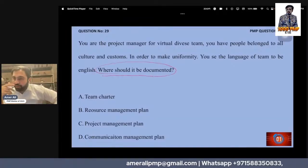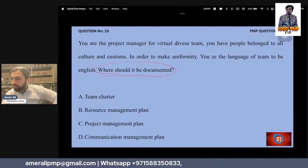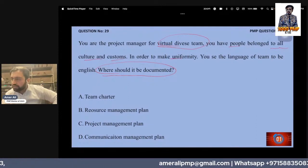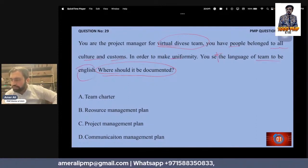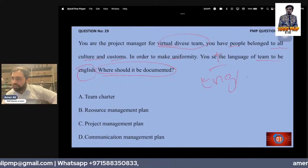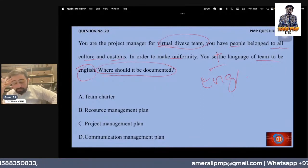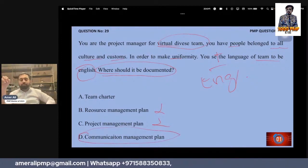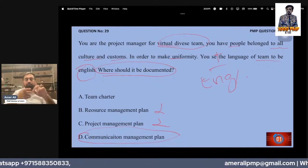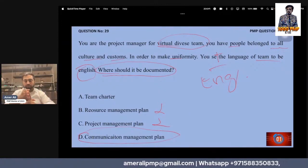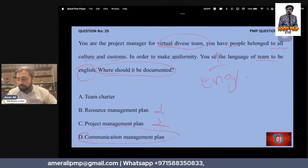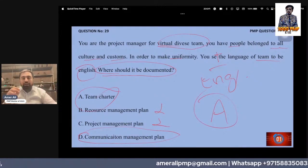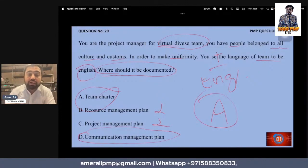Where should it be documented? You are the project manager for a virtual, diverse team with people from all customs and cultures. You decide the team's language should be English. Where should this be documented? The answer is the team charter. How the team will communicate, what language will be used, and what the team's values are — all of this should be in the team charter.